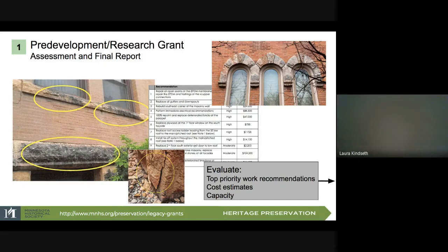So, what can you expect in your final report document? During the building assessment process, your architect will identify building character-defining features and conditions requiring treatment, document these conditions, make recommendations for treatments, prioritize the work according to most critical need, and provide an estimate for each treatment, thus providing the elements to create a preservation plan for all future intervention at the building.